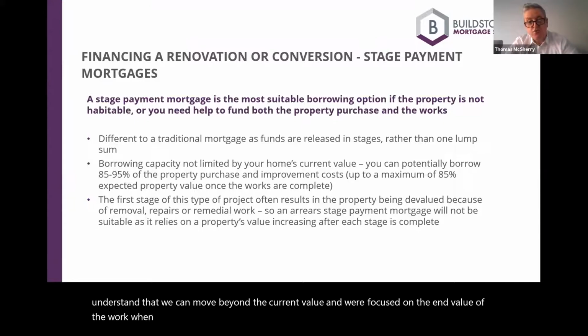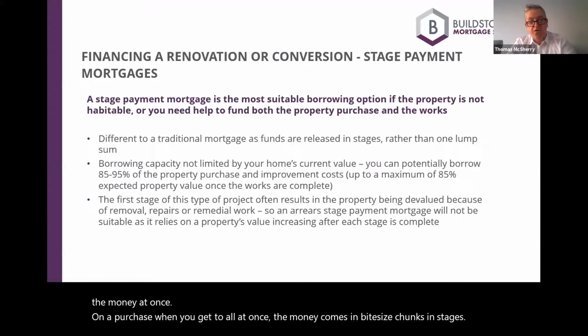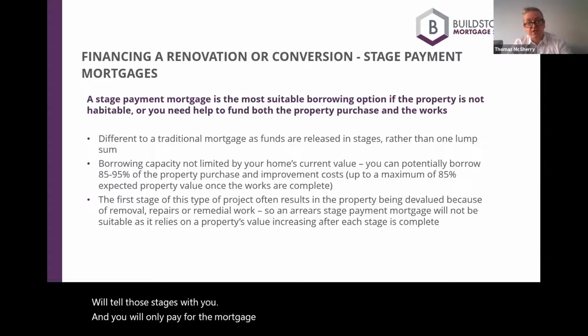The key difference, of course, is that rather than a remortgage where you get all the money at once, or a purchase where you get it all at once, the money comes in bite-sized chunks, in stages. We'll tailor those stages with you, and you will only pay for the mortgage on the amount that's released at each stage.